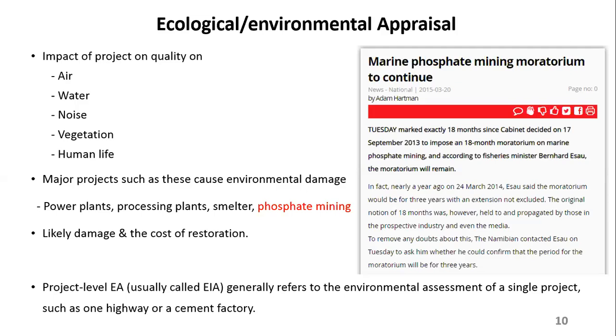I think you can do some preliminary tests or some experiments before, just to verify. Because let's say you want approval, what they call environmental clearance. If it's environmental clearance from the Ministry, those guys on the environment side might ask you such questions and you cannot answer them. If they ask what will be the impact of your project on the environment, you need to have full backup information on that. You have done a complete study on it. Like that, it will make things easier. If you do not do it at all, then those guys will start doubting you, that this guy is not sure about the things he's doing.